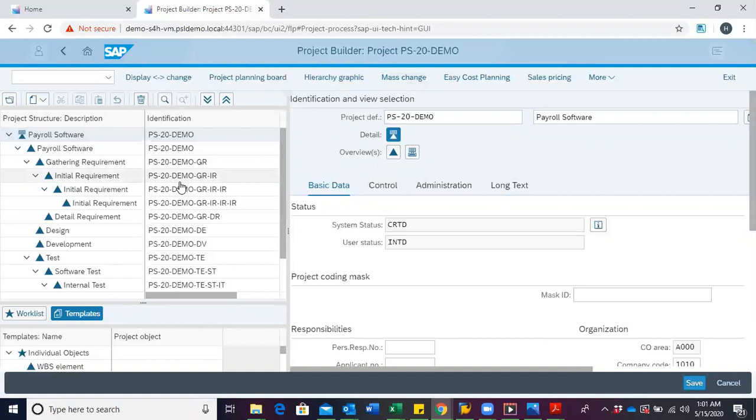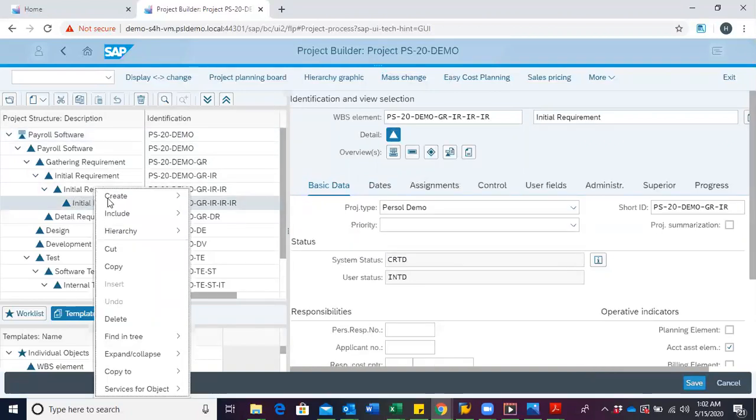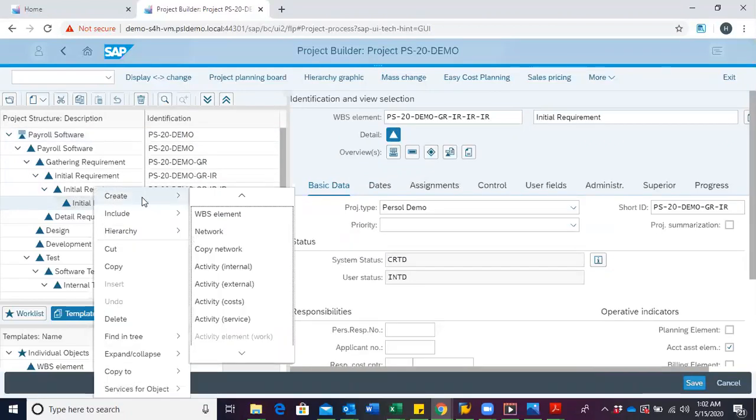To create a network, we right click on the WBS under which we want to create the network. Then we go to create, and this time we select network.